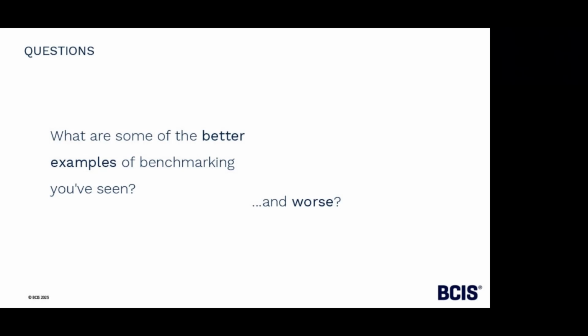So you can then start to understand, of those cost drivers, which ones we can influence, which ones we can do something about. Perhaps it's earlier engagement with a contractor. It might be buying some materials earlier in the process. All these things started to build into the picture to say, well, we know it costs that, but what should we be paying for something in the future? And that process was really fundamental in saving multiple £1 million in future contracts, really baked into their estimating process as well.